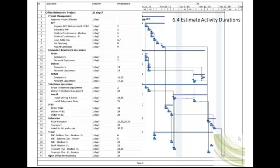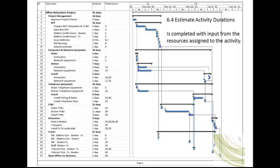MS Project is capable of displaying durations in hours or days. I prefer to assign a minimum of one day to activities during this process. One day is also the default for Microsoft Project. The process 6.4 Estimate Activity Durations is completed with the assistance of input from the assigned resources. Activity resources will have historical data to assist them in estimating activity durations. In the case of more complex estimating techniques, the resources will have the expertise to perform such estimates.